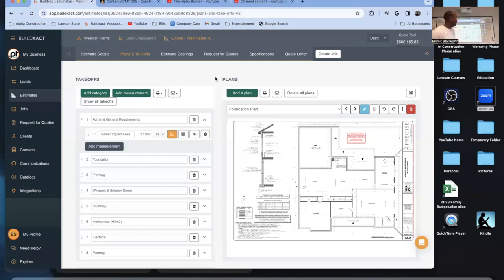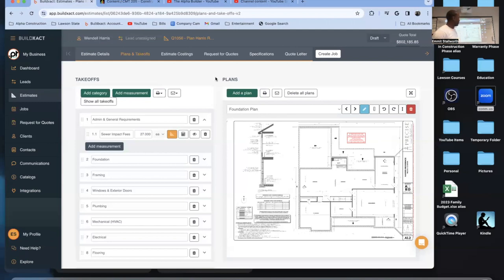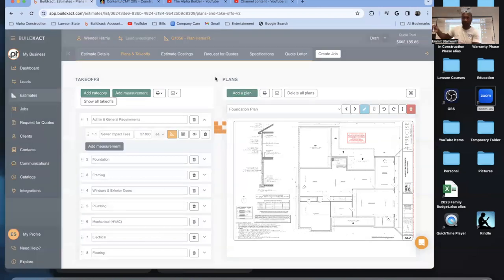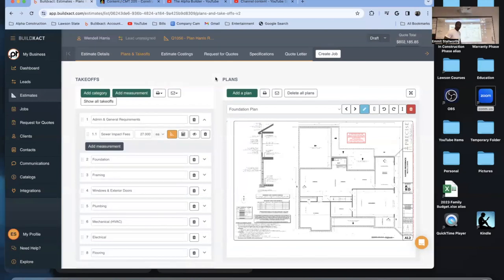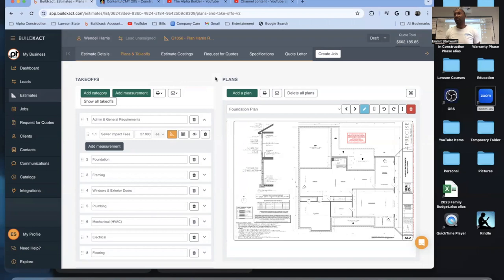$700 divided by 60 square feet equals $11.67 per square foot. So every square foot of that type of framing, the materials will cost me $11.67. You put that into your line item — say framing — and then multiply by the square footage of the actual project. For example, 4,036 square feet at $18.50 per square foot gives you a lumber package cost of around $74,000.